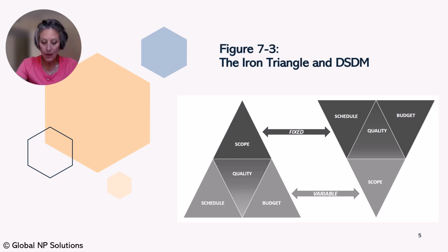Could have. Differentiated from should haves by decreased impact to customers and end users. These are desirable features but less important, also called nice to haves. Won't have. Features that are not included in this time frame of project deployment. These features and functions are kept on a requirements reserve list to clarify overall scope and to prevent scope creep of the project increment. Time boxing. One of DSDM's key practices, a time box, is a fixed period of time which is concluded by issuing a project deliverable.